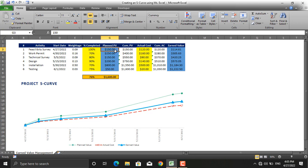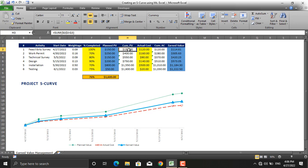Planned value is the amount that's estimated for every single activity, and here we have inserted just random numbers but in your case this might be real numbers that you have estimated. Next column is the cumulative planned value. For cumulative value, the value of the cell is added to the values of all the cells above that specific cell.